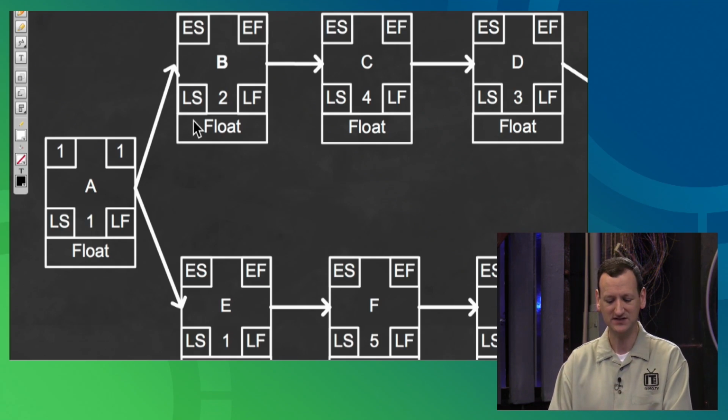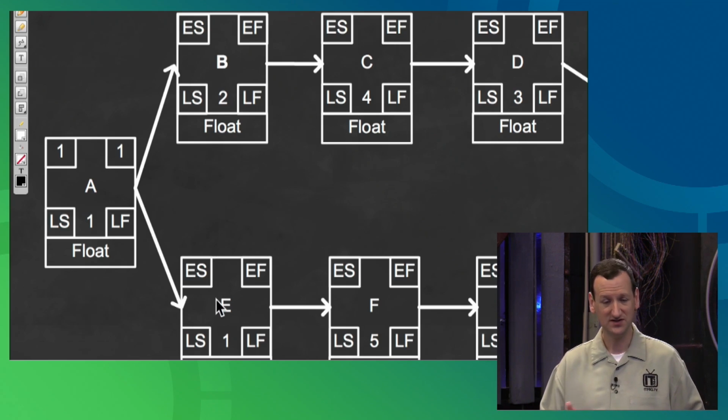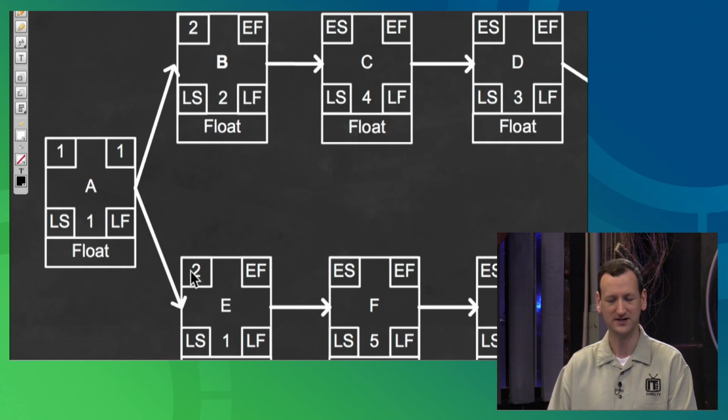So now I'm in day 2. So when I look at task B and task E, the earliest they can start is on day 2, right? This one took up day 1, and so now these guys are going to start on day 2, all right? So I fill both of those in.